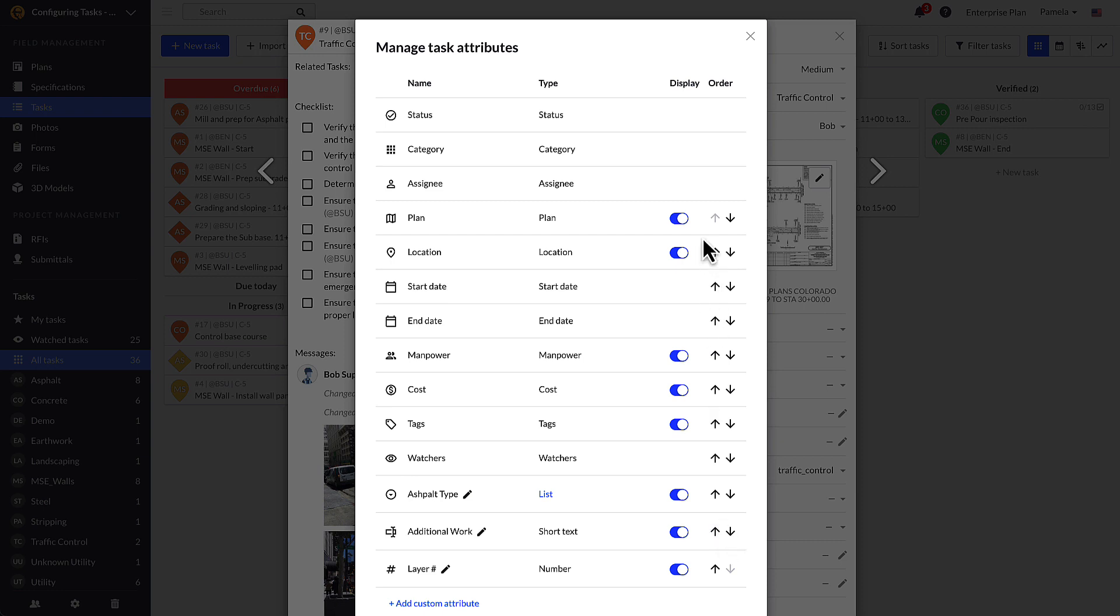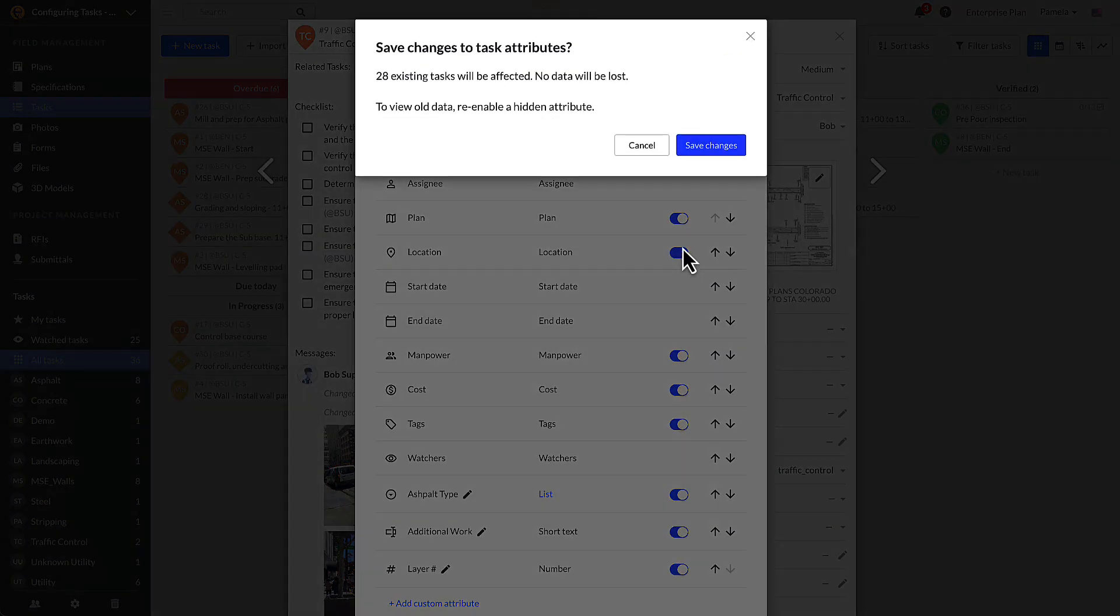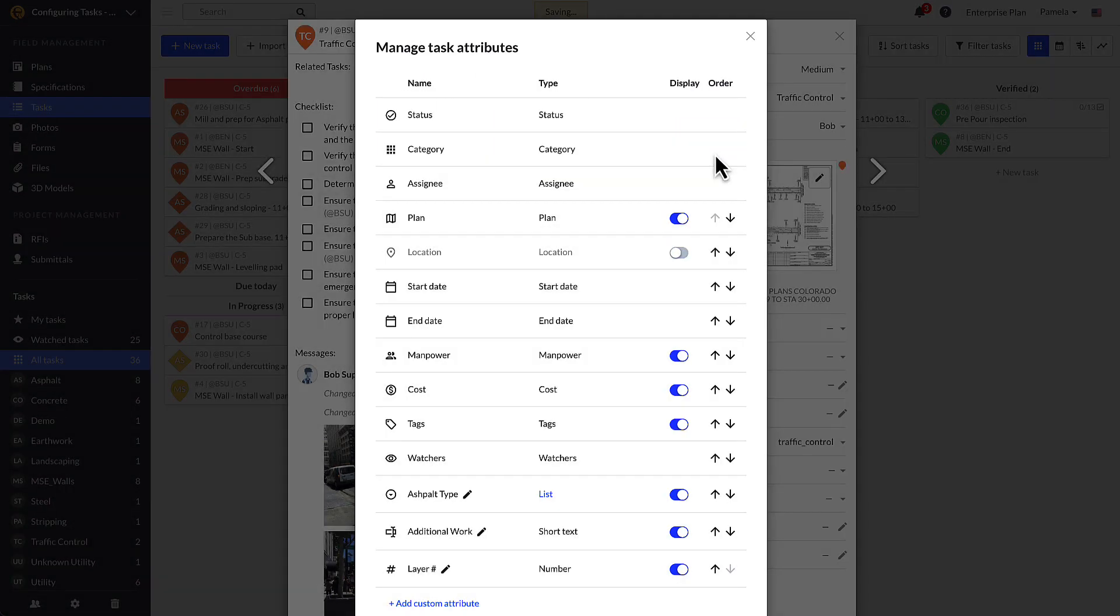You can also choose to toggle off the plan, location, manpower, cost, tags, and any custom attributes if these are not wanted. Keep in mind that by hiding any attributes, you are effectively hiding the associated data as well. However, the attribute data is not deleted, so by simply re-enabling these attributes, you will be able to view the data again.